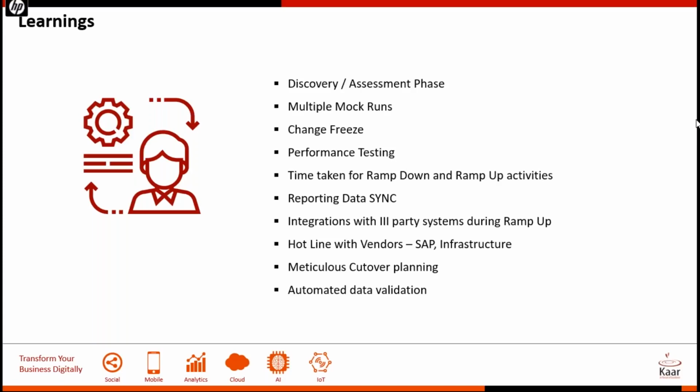Typically for an assessment, I would say anywhere between 5 to 6 weeks. And for a project, for a system, depending on the complexity and size, there are some variations that would increase the timeline, but you should be able to accomplish it in anywhere between 6 to 8 months. But for really big customers, if we are talking about tens of terabytes, then that's a different question. But otherwise, I would say up to 8 months.